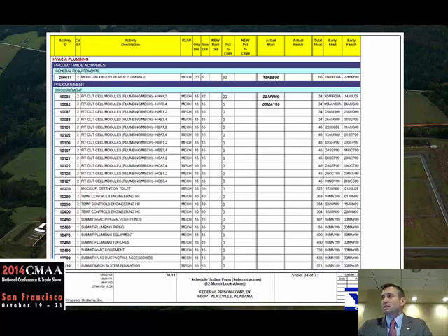What we did on this project is we stepped in and we said, your entire payment, if you're going to get any money for the work you did, it is directly tied to the schedule. Now, some get cost-loaded schedule, things like that. You hear that all the time. You don't have to have the federal requirement of a cost-loaded schedule to make that happen. Why not just pull everybody on the project into the schedule via the thing that most people are usually worried about, the dollars? If you can pull it back in and tie it back to the dollars, most people will pay attention to it. And so that's what we did on this project.